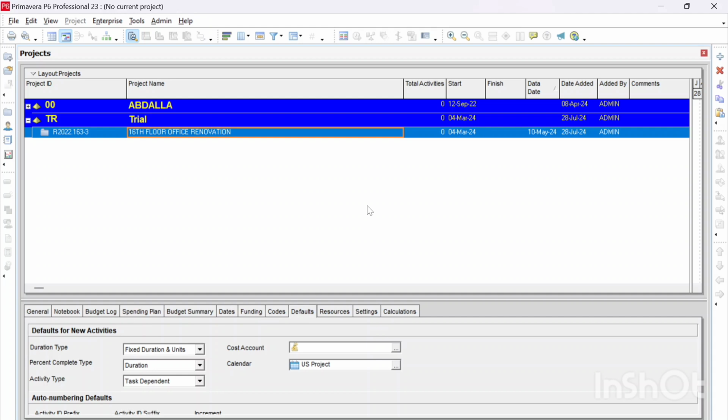So instead of sending the XER file to each subcontractor, and he can start updating and then send it to the next one and so on and so forth, you can send a reflection to each one of them, and they can work on the reflection and update it, and they can work concurrently and then send it back to you. So you'll save time, and it's easily managed, as you will see.